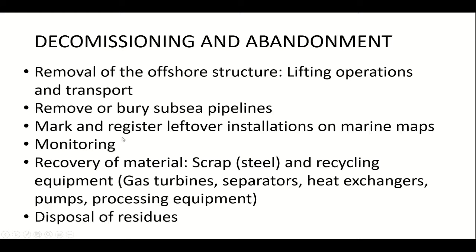After the offshore structure and the pipeline, you have to mark and register this on marine maps such that you avoid, for example, collisions with fishing boats. They know that there is something below that they might get, for example, the net stuck, or have a collision. Monitoring, you want to monitor if there are any leakages, for example, from the wells that are plugged and abandoned, that the seal is maintained.